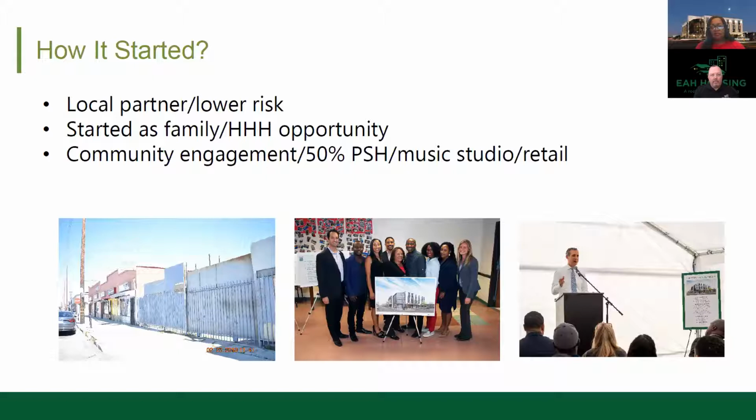We originally envisioned the project as housing for low-income families and applied for funding through the Los Angeles Housing Department as such. Upon seeing the self-scores of the other applicants, we quickly realized that it would be tough to get the project funded as conceived. As luck would have it, the voters of Los Angeles had recently passed Measure HHH, and as an applicant to the Housing Department's managed pipeline, we were offered the opportunity to be part of round 0 of the HHH program.